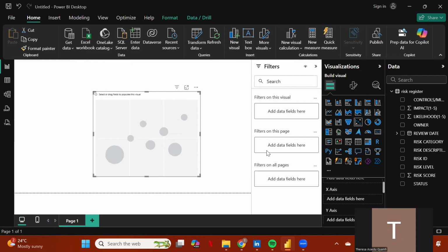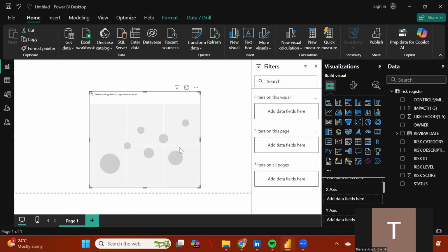A scatter chart helps you to know which risk is highly volatile, like which one needs a lot of concentration, which risk needs to be dealt with, as their likelihood and impact is really high, making their risk level also high. Just before we input our values, as you can see from the dummy model, any item that falls in the top right corner is a risk that needs the most attention, because that risk has a high impact and a high likelihood. Okay?